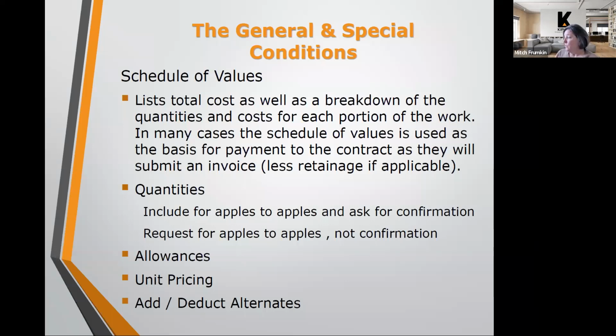That can't be determined until the surface materials are removed. So the unit pricing for a roofing project would probably have an item for roof sheathing and for flashing, for those items that may need to be added to the project afterwards.